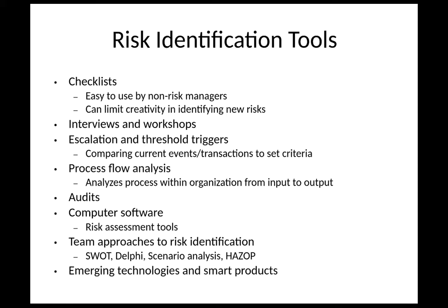Another tool: interviews and workshops, right? What I tend to do when I do risk assessments, I've done those for years for different organizations, and a large part of that is I use multiple of these things. I look at the checklist, I look at the loss history, but then I'm going to interview the managers and a lot of times the employees, and get an idea of how their operations work, what's their process, their flows.